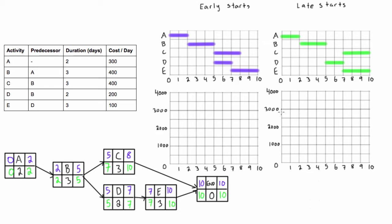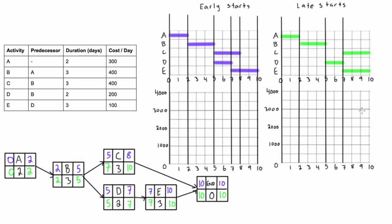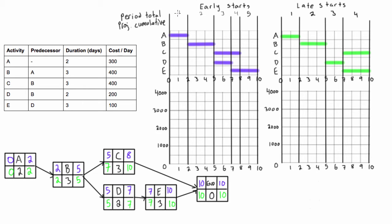Now we need to break these up into periods. Periods start and finish at any time that an activity starts and finishes. For early starts we'll have periods one through five, and for late starts we'll have periods one through four. We'll record the period total and project cumulative. In period one we only have activity A, which costs $300 per day, and we have 2 days, so the period total is $600 and the project cumulative is also $600.